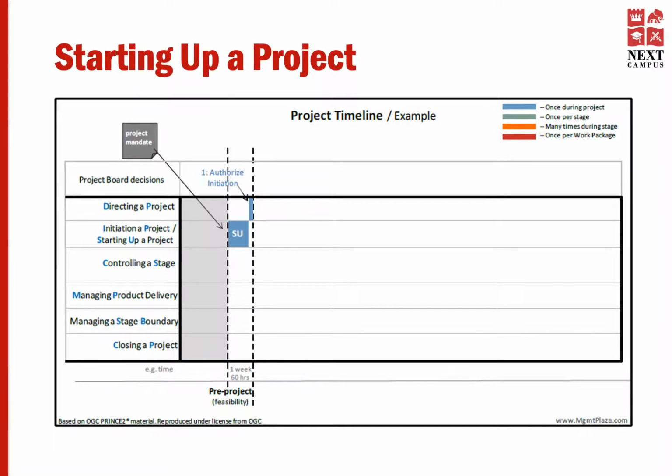At the bottom of the diagram, you can see the text pre-project. The SU process is considered to be outside the project. Actually, the project does not start until the project board takes their first decision. So the SU process provides the information to start the project.